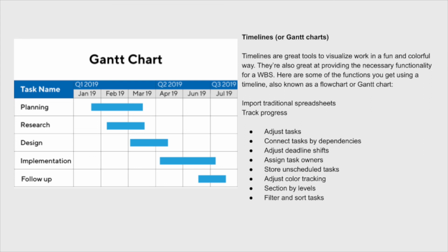Some of those can overlap, meaning that they can go on at the same time. So planning and research can both occur at the same time. You notice that one overlaps the others, whereas others need to be completed before the next one can begin. So for example, design really needs to be almost wrapped up before implementation begins. So the Gantt chart is a good way to look at the overall project from a timing perspective.